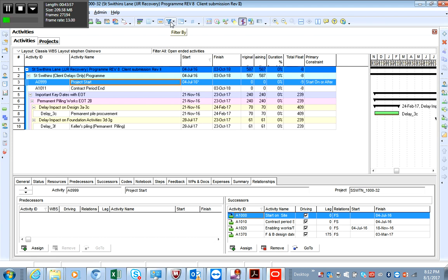So if you select a prevention strategy, what that means is you're taking the adequate measures prior to the event actually materializing. So you know that it is a residual risk, so it has a high probability of occurrence. So you will take all the measures, you will implement QA checks within the program, which means you're building quality into the program. You're making sure that the program has all of the requirements as per the contractual obligations. That's literally what it means.